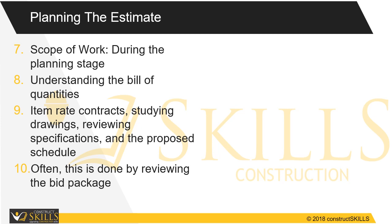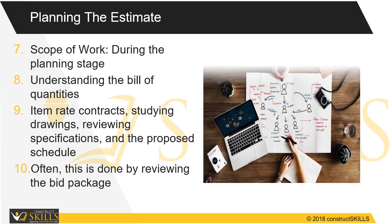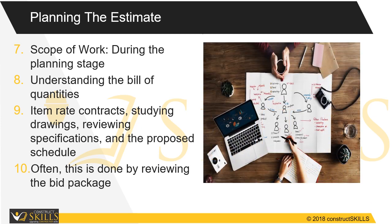This involves understanding the bill of quantities for item rate contracts, studying drawings, reviewing specifications, and the proposed schedule. Often, this is done by reviewing the bid package and identifying which of the company's cost codes are needed for the project and what pricing needs to be obtained to complete the estimate.